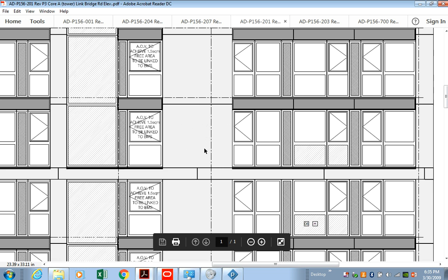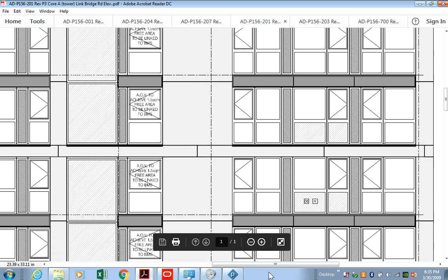This is the stone panels, windows. All of these would actually, for the individual windows, come in a window schedule. So you would get all of the drawings and you could build off of the drawings. So if you look through the elevations, you can see how many windows you have to fit. And what you would do is you would ideally request how many gangs would be required to fit one window.